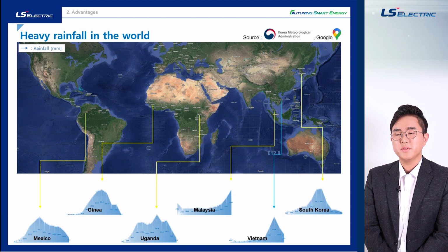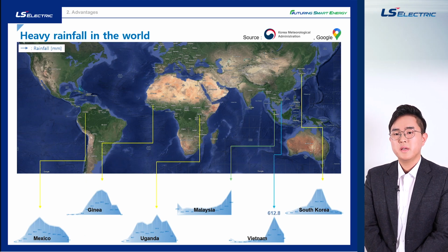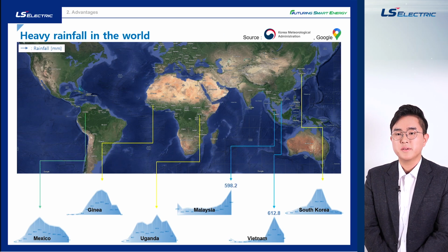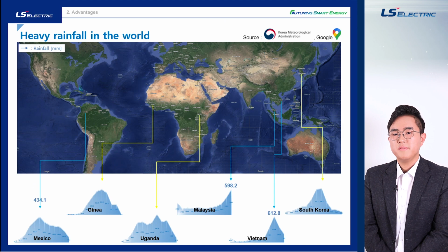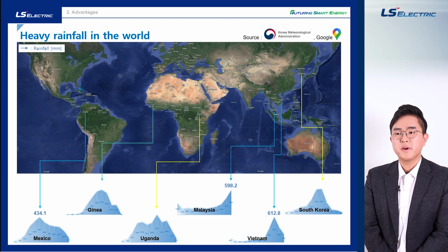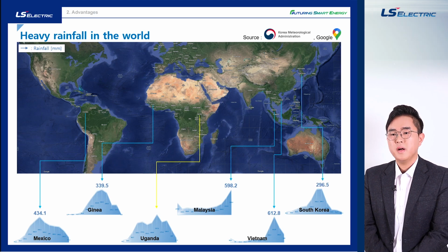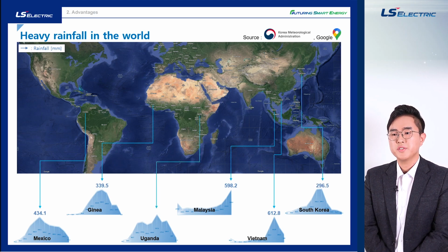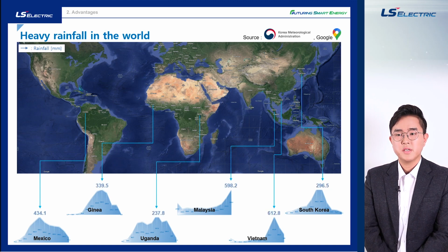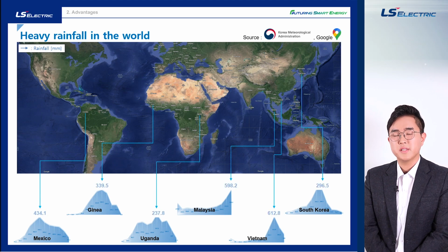This map shows the well-known heavy rain regions in the world. Construction equipment or vehicles often fell into the mud and block the road during rainy season. Flooding is going to make it difficult to procure personal equipment. Sudden rain would cause work stoppage and equipment damage. And problems can inevitably pop up during commissioning despite thorough management. Moreover, if the schedule is tight, we will risk incurring a sharp cost increase and project delays.